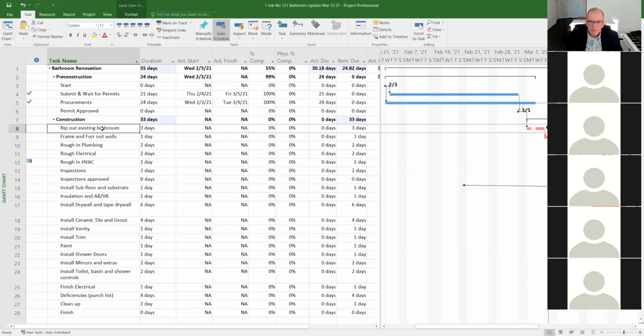Typically, you don't get extra money, but if it was liquidated damages on the contract, you get freed up of the liquidated damages. So you're not accountable for them because that was outside your control. So it can get quite intricate on those types of projects that way. But the tool that you can use to show something didn't happen is the split.